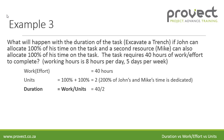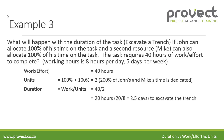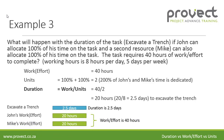Duration is work divided by units: 40 divided by two equals 20 hours. Twenty hours divided by eight is 2.5 days. So it will take 2.5 days to excavate the trench if both John and Mike allocate 100% of their time on the task. John will be working 20 hours and Mike will be working 20 hours.